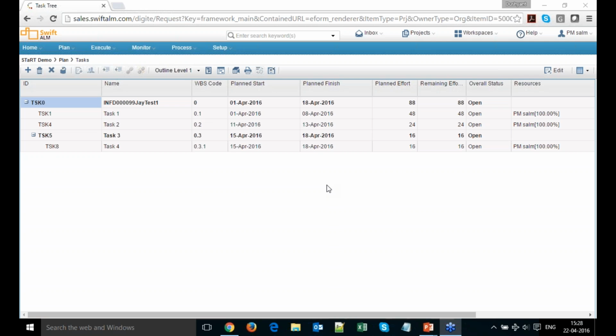Well, if you don't link the tasks, the dates of the independent task will not get changed. So the question is, is there any other way the dates of other tasks don't get affected by changes to the date of any other task? To answer that, if you have not established a dependency between two tasks, then your independent task will not get affected.